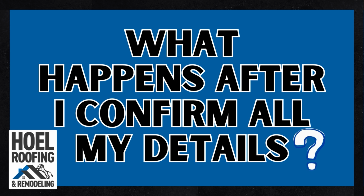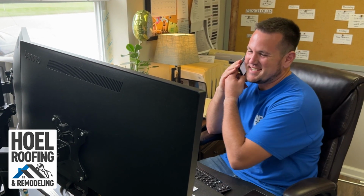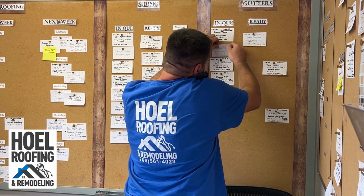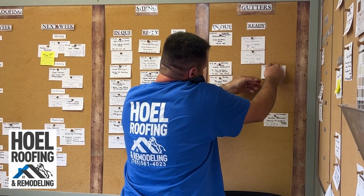Once everything has been confirmed, I will go ahead and place your material order with our supplier. Sometimes, depending on if it's siding or roofing or a special color, it does take a couple of days for our suppliers to get their hands on it. After everything has been ordered, I send it over to Jonathan, our production manager. He's the one that gets everything scheduled. As soon as our suppliers let us know that all the material needed for your specific project is ready for us to get our hands on, Jonathan will reach out to you and we will get you scheduled.